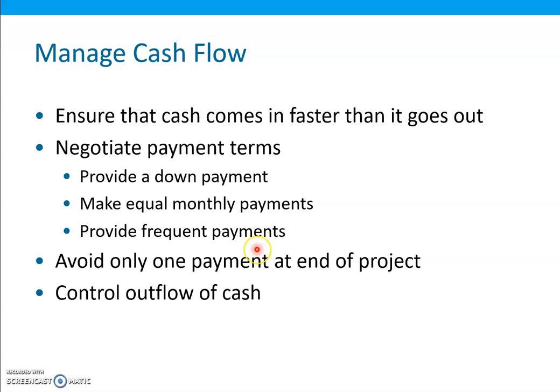So the worst scenario from the contractor's point of view is to have the customer make only one payment at the end of the project, and the customer can control its outflow of cash by delaying payments until it is due. Okay.